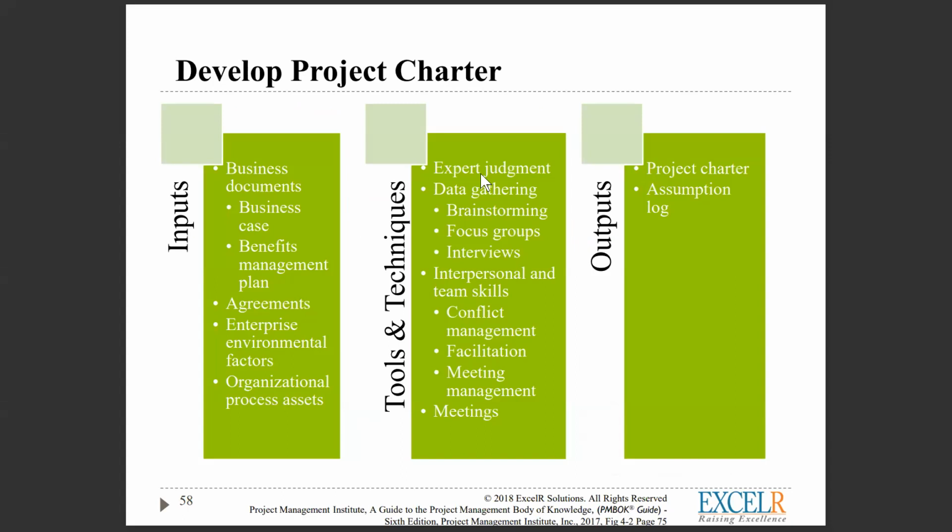What all goes into the charter as input? I showed it, right? It has business documents, benefits, project management plan, agreements, enterprise environmental factors, OPAs. And how to do the project charter? These are the tools and techniques you use: expert judgment, brainstorming, interview sessions, or focus groups. In brainstorming, you sit with people of the same mindset, brainstorm on the requirements, come up with the exact requirement and put that into the project charter. Focus group is the same thing. Then interpersonal skills: if there is any conflict between you and the management or your stakeholder, bring in conflict management.